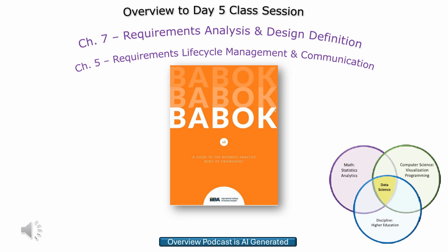Okay, so let's talk about baselining. We talked about this a little bit before. It's about creating that snapshot of the requirements, right? It is. It's like taking a picture of them and saying, this is the official version. Any changes after the baseline is established have to go through that formal change control process. Right, so we carefully evaluate the proposed changes, make sure everything's documented and communicated properly. Exactly. It helps you maintain that control, prevent those unauthorized changes.